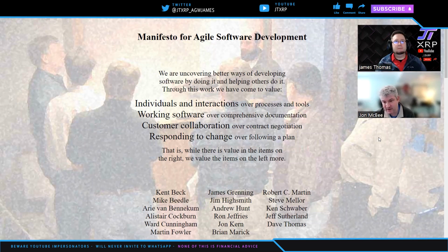The four things on the right are how people expect software to go. But if you lean into that expectation, I can almost guarantee you it's not going to go well. The bigger the project, the harder it is to be successful. If you focus on delivering functioning increments, and after each increment, you have a built-in process for injecting change or feedback from the customer, it's so much easier to be successful. You always have a picture of where you are and where you're going can change. And you always know how much money you've spent, right?